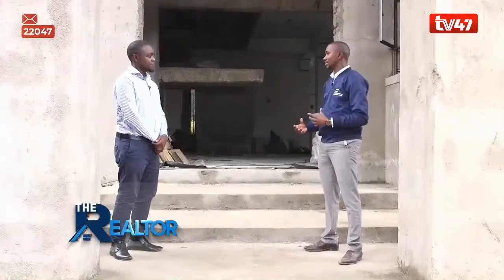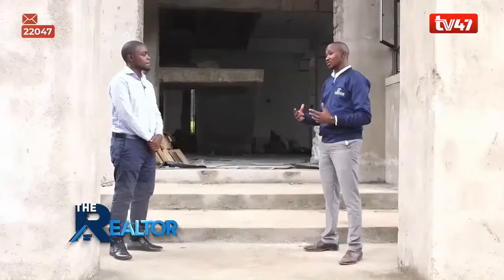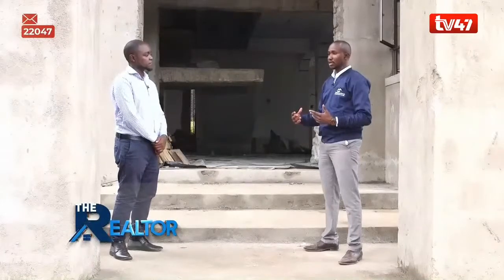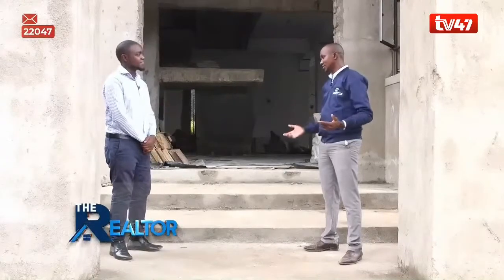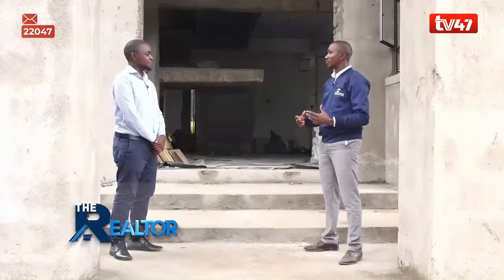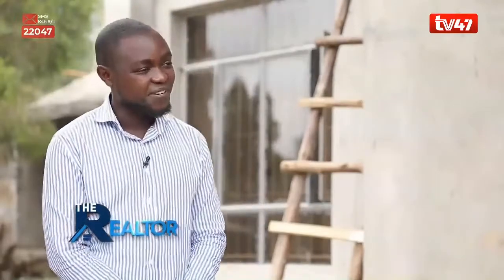He doesn't have the funds. Right. Yes, so you are forced to maybe stop the construction or suspend it for some time until it comes back. For example, we have stopped a house, let's say in January, but by mid that year, things have changed in Kenya. Like right now, the cost of steel is very high, so you are forced to go back to the customer and ask for a bit more. But these are situations that are external, and you cannot really do anything about them.